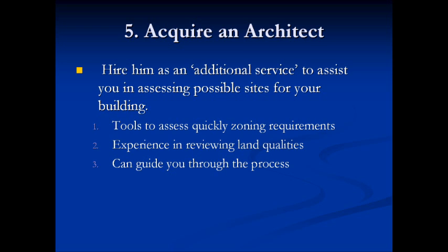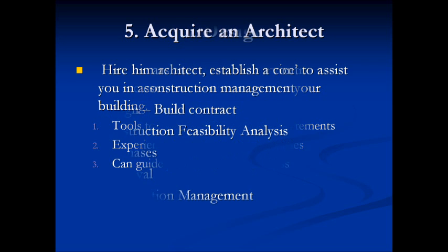And if the soil isn't strong enough in and of itself, it doesn't mean your project is wiped out, but it is going to cost a lot more to do it because sinking piles into the ground can be an expensive process.